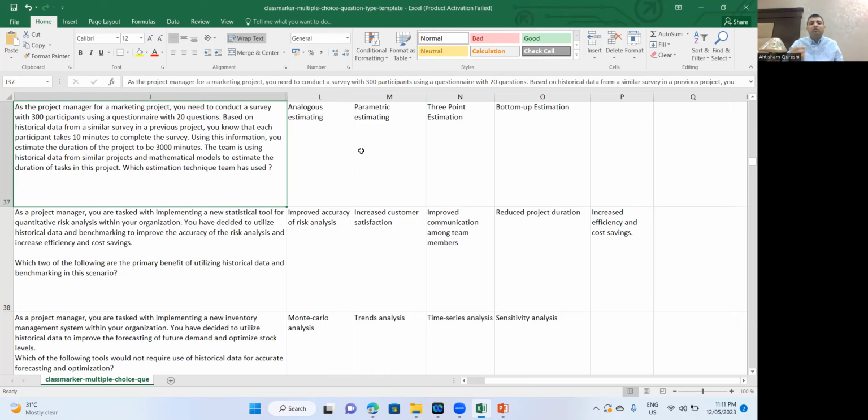If it got done in 1 day for one truck, and there are two more trucks to go, then 2 more days are required. So it's a linear equation. If you are buying something like 10 chairs costing $100, and you want to buy 20 chairs, it will be $200. Simple, right? So it's a parametric equation, with two parameters, x and y.